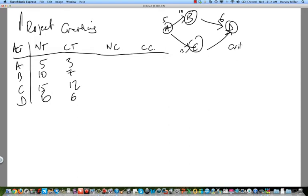So my critical path is 26. This is 15, 21. So critical path would be A, C, D at 26. And so that's my critical path. The other path is A, B, D at 21. So there's a difference of about five days between them.